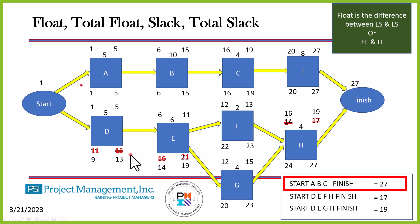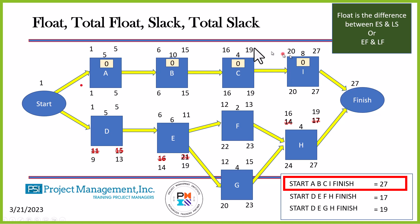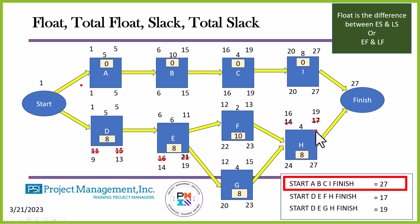Now I have established Early Start and Early Finish for each activity. I subtract Early Start from Late Start to find the float. For the critical path activities: float is zero. Float of D: Late Start 9 minus Early Start 1 equals 8. Float of E is 8. Float of F: 22 minus 12 equals 10. Float of H: 24 minus 16 equals 8. Float of G: 20 minus 12 equals 8. That's how we calculate float.